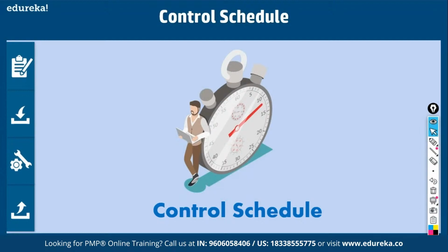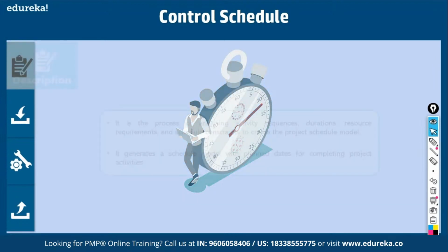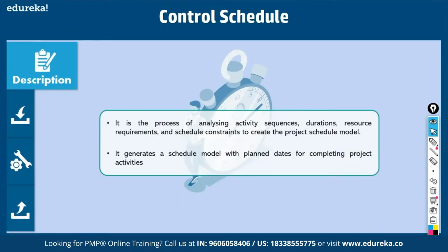Then finally, we have a process called control schedule. Here we make sure we complete the project on time. So you analyze what the variances are, why these variances happen, why did the schedule slip? Is it because you did not get materials on time, or because of poor material quality, or there was over planning, under planning, over utilization, underutilization? So you look into why these variances happened.